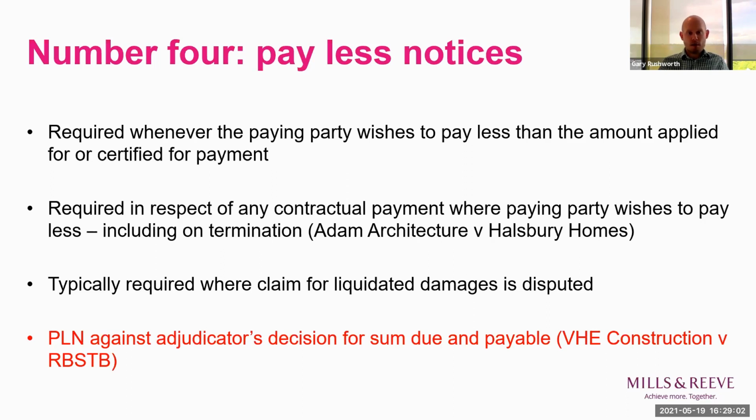And bear in mind here that on termination, payments might flow from the contractor to the employer. So it might be one of those slightly rarer cases where it's actually the contractor who's serving the pay less notice rather than the employer. That also arises in relation to liquidated damages.